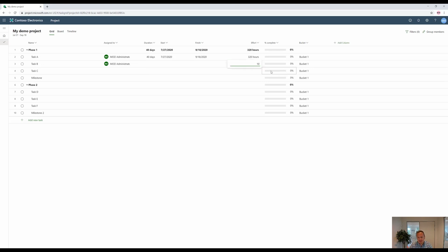So you have one task where you can spend 10 hours, but you can spend the entire week to do it. So 10 hours in this case, you can add here. And then if you click over on the duration part, you'll see that it just writes 1 day. The reason is that I started off by writing in the effort column rather than in the duration column. So now I can actually say that the 10 hours should be distributed over 5 days, like this.